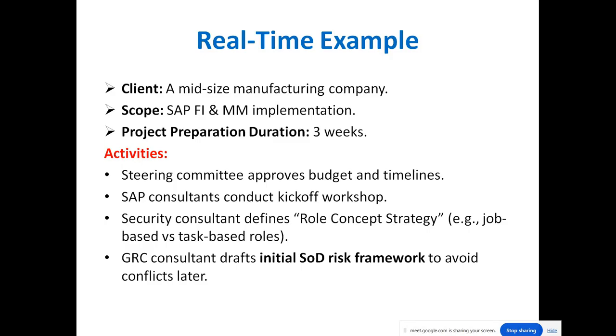The steering committee approves budget and timelines. In what time? Are you going to take 9 months, 1 year, 1.5 years, or complete in 6 months? As per my knowledge, because I also supported foreign clients: if you are working in India and implementing any SAP product, it will take 1 to 1.5 years. But for Gulf countries or any foreign country, they are not giving that much time. Within 3 to 6 months you need to complete, by hook or crook, because they have very tight deadlines. You need to work hard and finish it. They want this client. This is the difference.